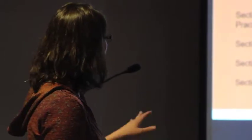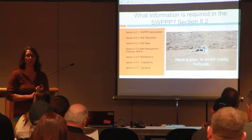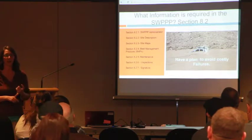Because if you don't, your SWIP is incomplete, it's not a very good plan. So you have to identify the people who are responsible for doing things on your site. Who's your SWIP administrator? Who's going to be responsible for inspections? Who's going to be responsible for BMP maintenance? If they're going to do it, they need to be in your SWIP.